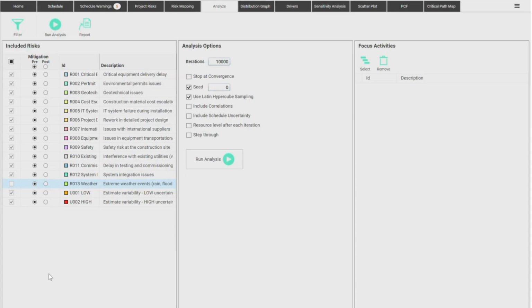Remove the risk, run the model again, and see if it matters for your KPIs. Okay, if it matters, then let's have this discussion about how to mitigate this risk. If it doesn't matter, you see no benefit of mitigating the thing, so you can skip this one and talk about the next problem that we have, okay? That's a very quick way to test ideas, scenarios, either pre-post mitigation or with or without specific risks, okay?